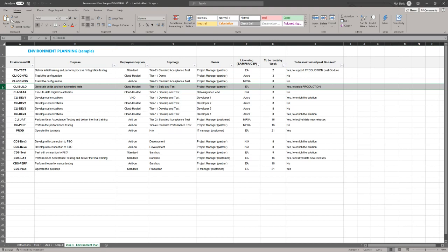And then the last thing that I want to draw your attention to on our completed plan here is that those are considerations that we made early on in the implementation. But one of the most important things to remember about preparing and using this environment plan is that we want to go back and periodically revisit this plan, at key milestones, to make sure that the considerations, assumptions and determinations that we made when initially developing the plan are still accurate and that they still match the timeline.